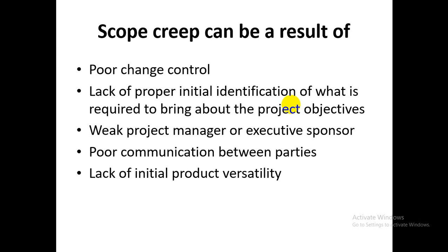First and foremost, we are looking at poor change control. Some managers fear change. In that way, if you fail to control change, then scope creep may arise. Secondly, there is lack of proper initial identification of what is required to bring about the project objectives.